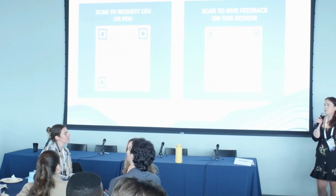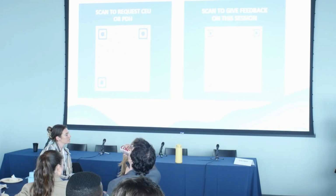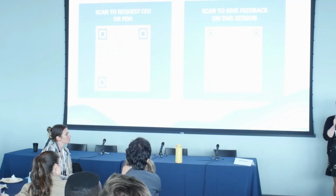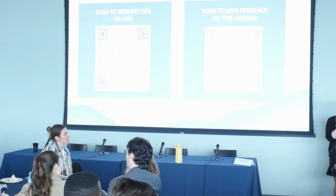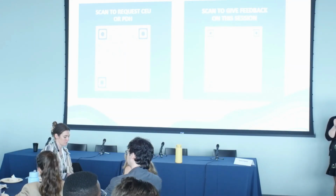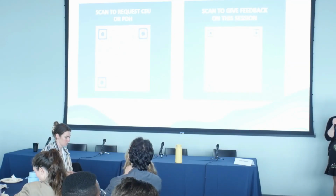I think we are going to be, as part of both our WEDG and also the ILFI, and I would defer to our Director of Sustainability on this because I'm not the expert, have to do a certain amount of reporting of how the building is performing and also how the on-site features are performing. A big part of our joint permit application from the Army Corps is a habitat monitoring program, especially for that Pier Inlet area. We're in the process of developing that now, but want to make sure that there is information to go out to the public. We can better adjust it.